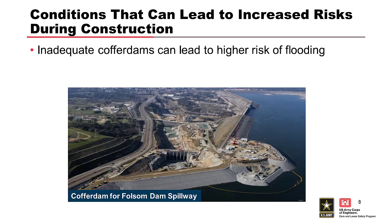Cofferdams can increase the risk of flooding if not properly designed. This photograph is from a cofferdam at Folsom Dam where the spillway construction risk is mitigated by constructing the cofferdam at the full height — the same height as the main dam — to provide the same level of protection. This cofferdam protected the work for the construction of a new spillway, which had been completed just a few years ago.